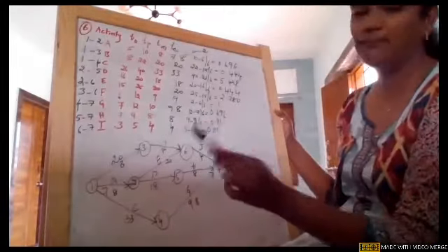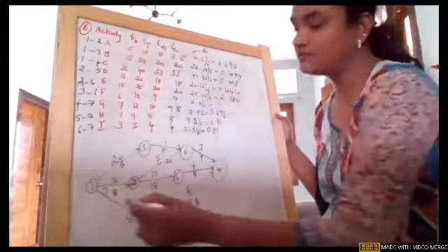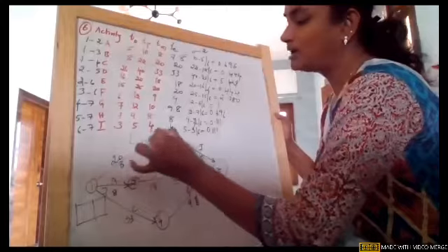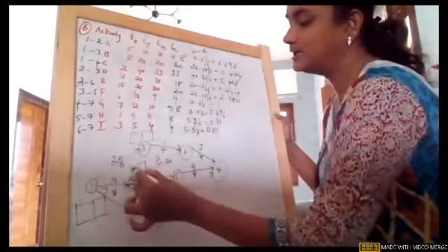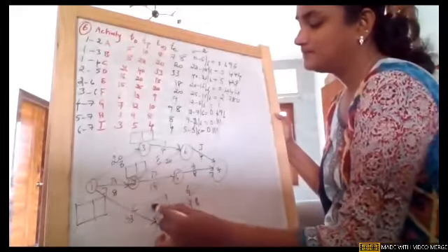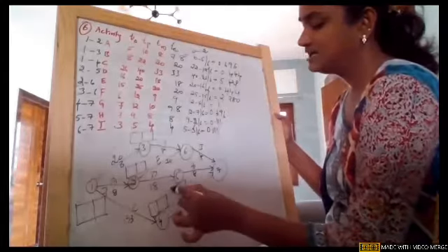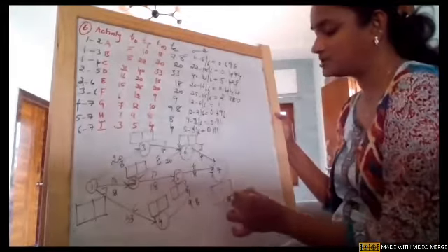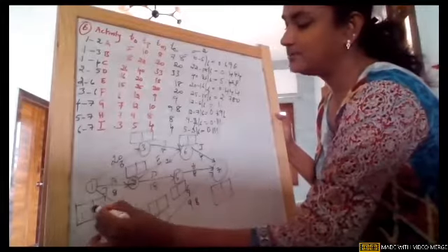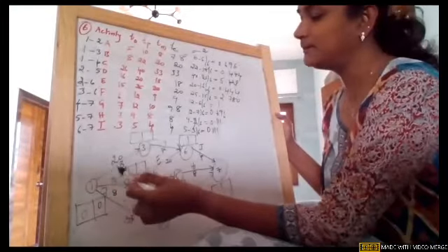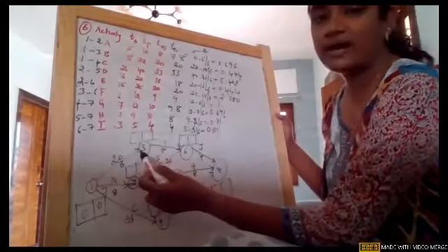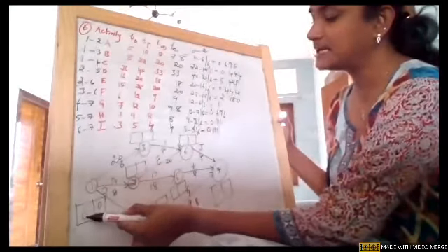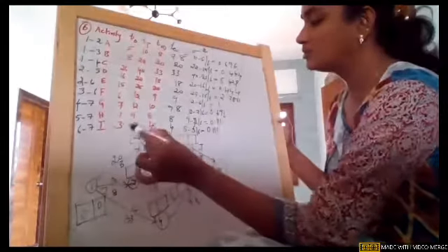So this is how we completed the network. They're asking us to find the earliest and the latest times for every node. For the critical path, we anyhow need to know them, so we follow the same procedure. If there is a single arrowhead, directly add to the previous earliest time: 0 plus 20 is 20 on node 3.